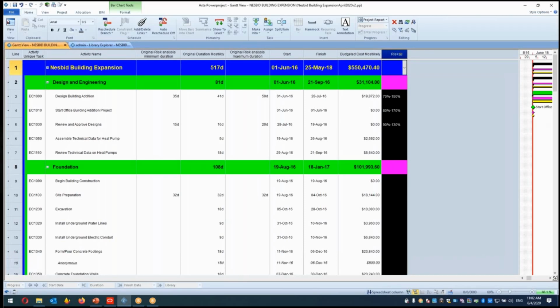You can create a field called impact to time, impact to safety, impact to quantity, and you can give it low, medium, high. And for each factor you give, you can also make a formula and calculate probability or impact. This will be applied for the calculations.